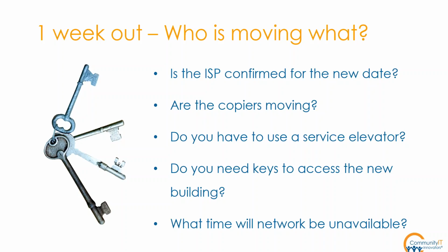Yeah, that's huge, just having the overlap, because then you know your major issues are covered. But it's hard to do if you're keeping the same ISP, because they'll usually want to take your circuit and just move it over at the time of the move. So you can't always help that. But a lot of times the ISP will work with you and do what you would like them to do. You just need to ask.